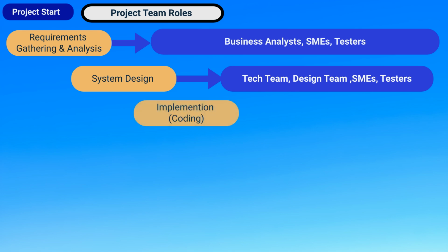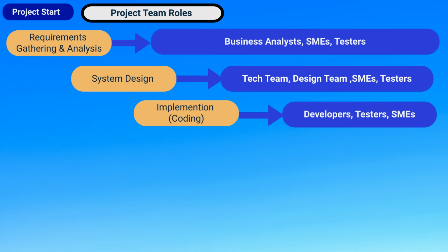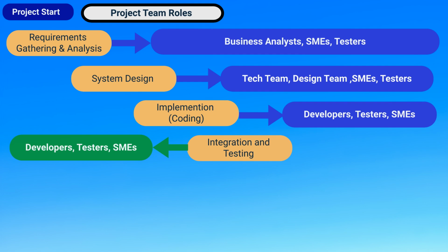The implementation stage is where the developers get busy. On some projects, test analysts are involved in the interactive development or prototyping, and sometimes asked to participate in code reviews. The SME are also asked for guidance from developers, but that's usually when an interactive approach is used. The same team is involved in the next phase, integration and test, but the focus shifts to testing, with developers supporting the test team by fixing defects. SME are usually involved in the later test stage of user acceptance.